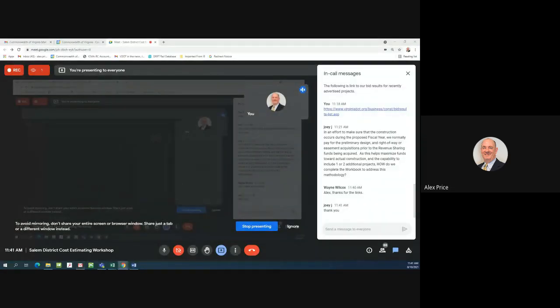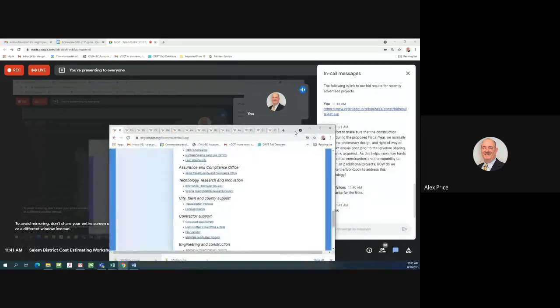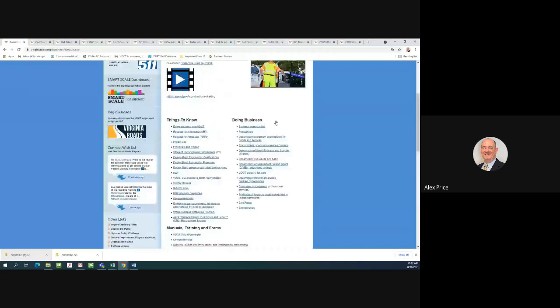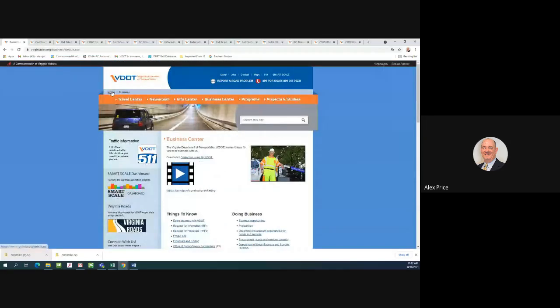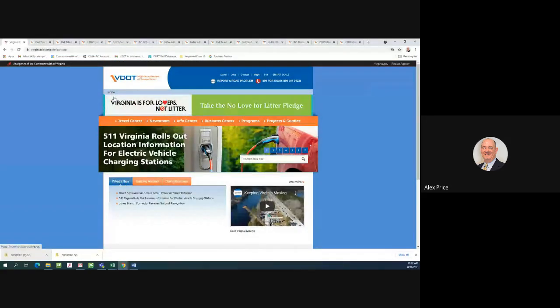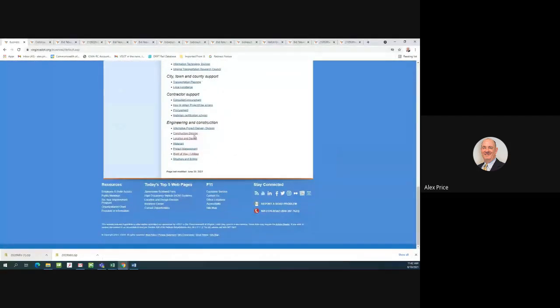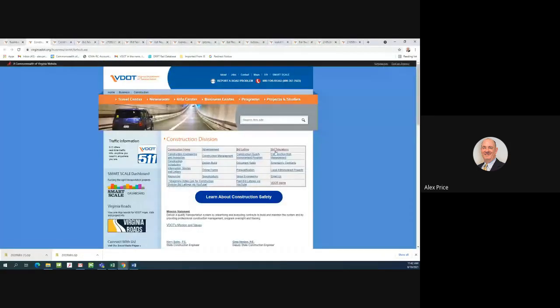You really probably need to know more about what is being advertised out there, and certainly we can help you find products that may be more representative of the jobs that you're estimating. But this takes us back to what I had shown previously. This is the VDOT or VirginiaDOT.org webpage, Business Center. If you'll scroll down to our construction division, there's a couple headings up here. You've got bid tabs and you've got bid lettings.